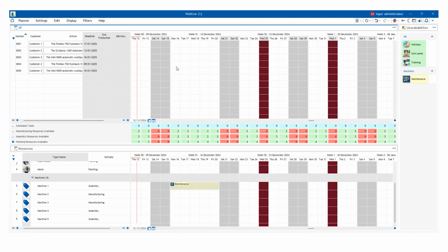So VP Automation will allow the user to automatically schedule events by associating resources, human, machine, or whatever kind of resources, based on several criteria. The first one will be that we will respect the preset activities that we have defined earlier. The second one is that we will assign these resources based on their corresponding skill set.